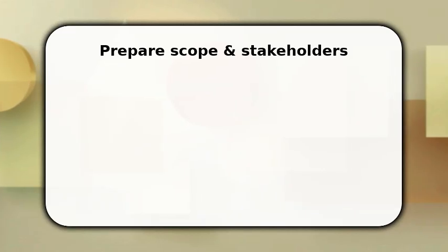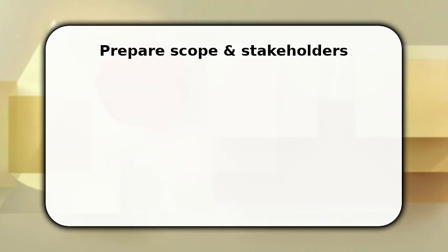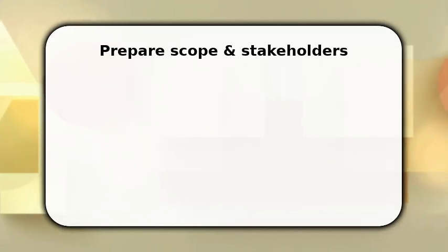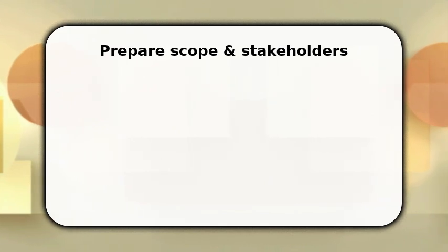Once done, list stakeholders, sponsor, SME, L&D, IT, and get their time commitments. Collect baseline data, current skill gaps, prior training hours, and budget dollar. This justifies resources. Do not delay. These prerequisites let you draft objectives and timeline immediately, so you can move into design without rework.